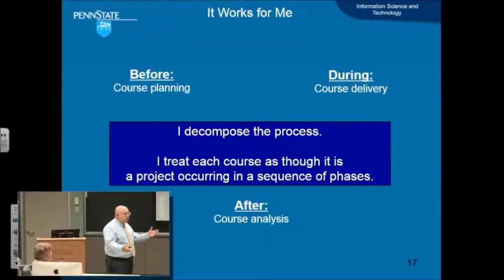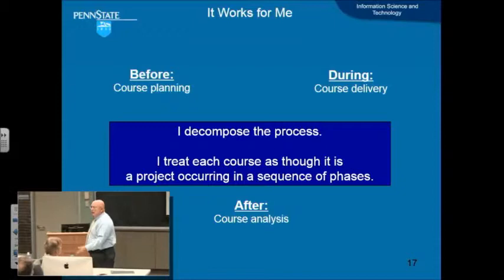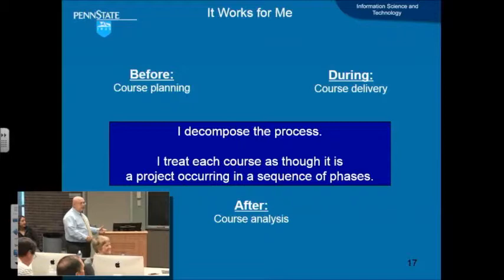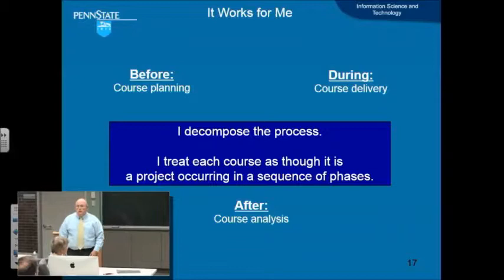It satisfies the definition. It has a definite beginning, well, sort of. And the beginning is, where is Kathy? There you are. When I hear from you what I'm going to be teaching. And it ends when I put the grades in, and maybe a couple of days later, because there's always complaints. So it's got a definite beginning and ending, and I know what's got to go on between the beginning and ending. So I take the entire process and divide it into 3 parts: planning, delivery, and course analysis. Folks, there's no magic in it.